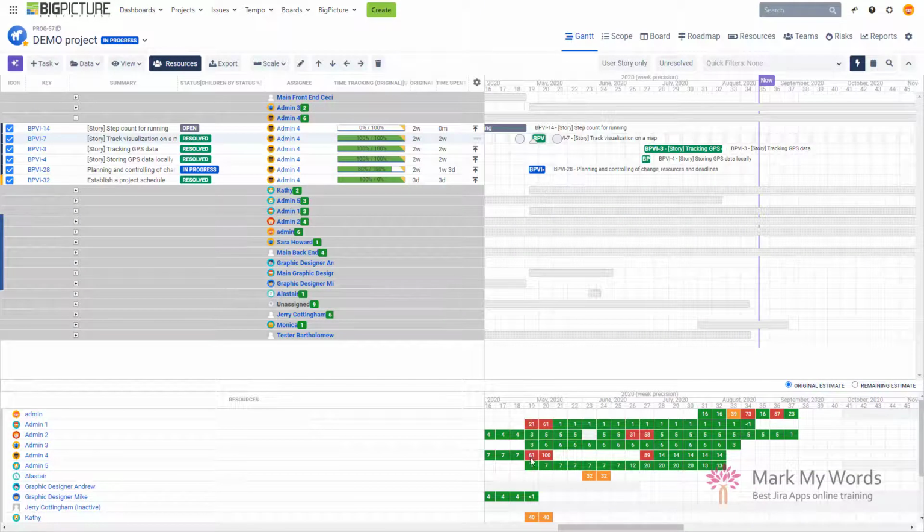So for example, look, I'm looking at the 19th of May. This is where he has 61 hours assigned, and I can see that this task and this task are probably causing the problem, right? So, probably these tasks just have too big of an estimate. They should be broken down into smaller parts, or maybe they should be stretched in time, or maybe they should be reassigned to a different person. One way or another, look how quickly I've managed to identify where the problem is coming from.